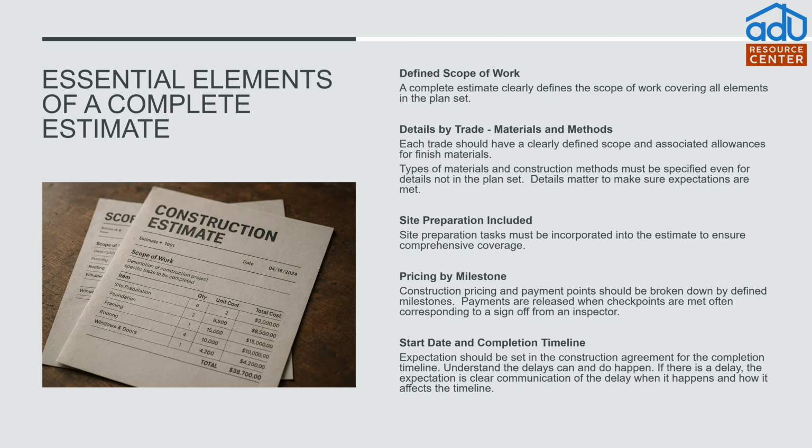But we want to be clear. We want to make sure that you understand what the overall timeline should be, when the completion date should be. And if there are delays, then the delays are clearly communicated when the delay happens and for how long that delay was, so that you can add that time to the end of the project completion timeline and still have an idea of exactly when this is going to be done.